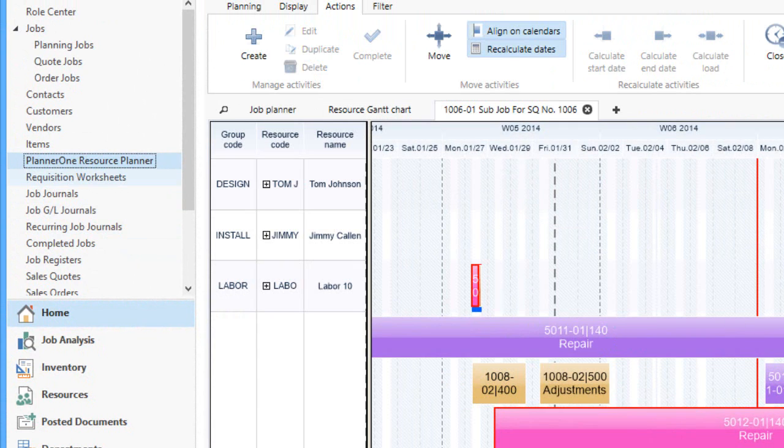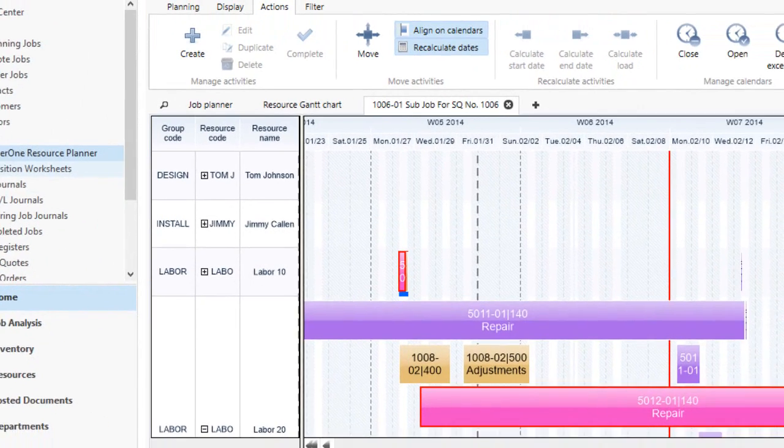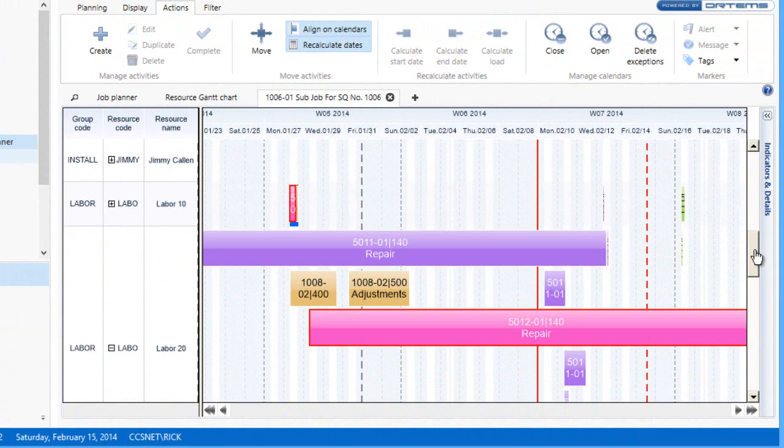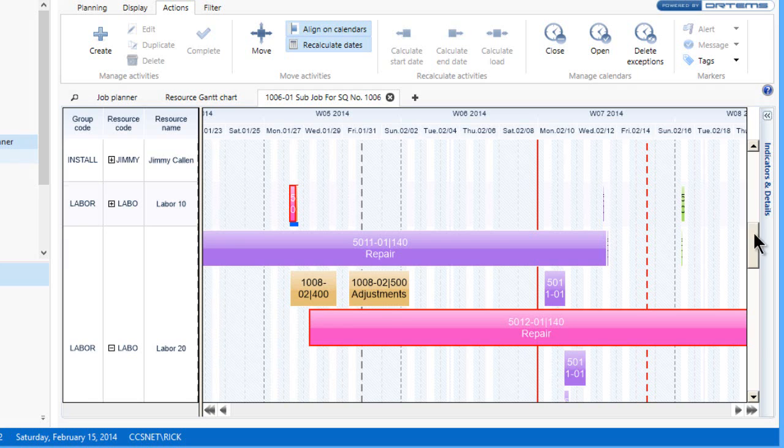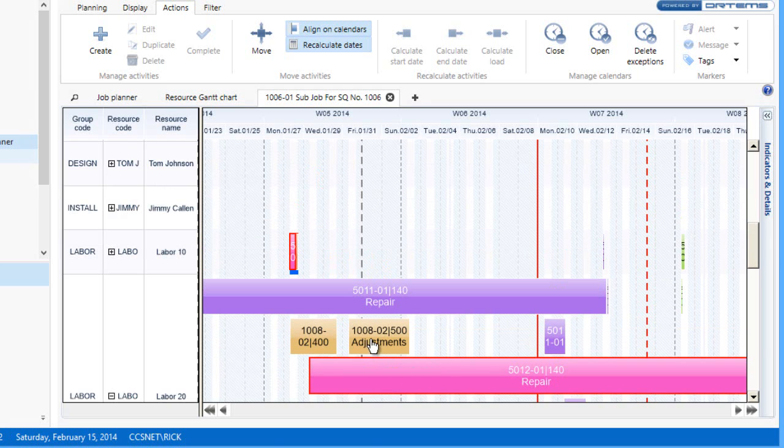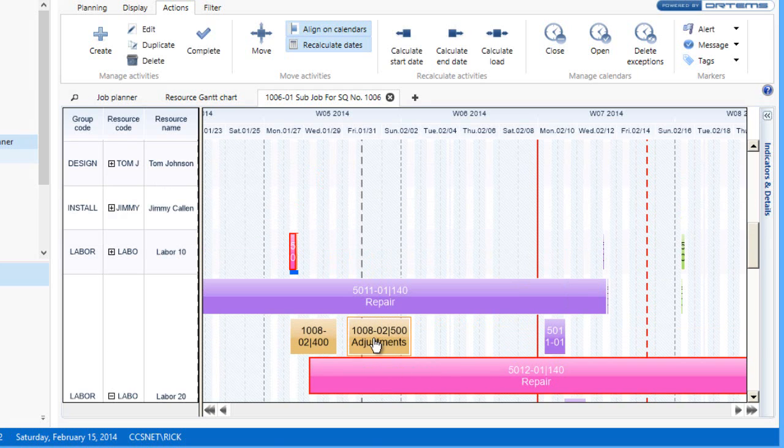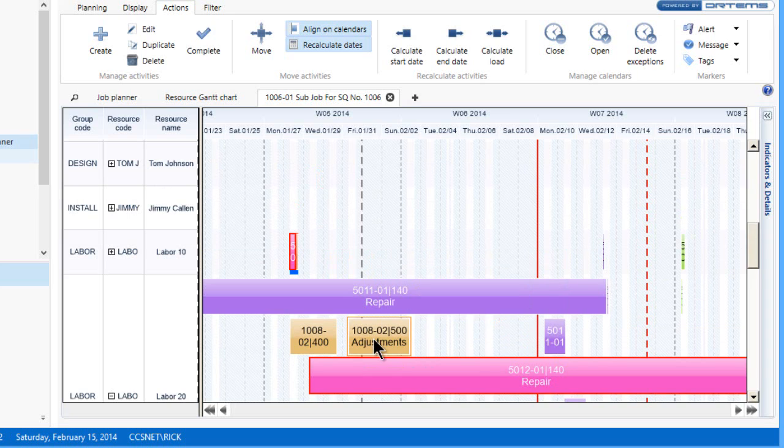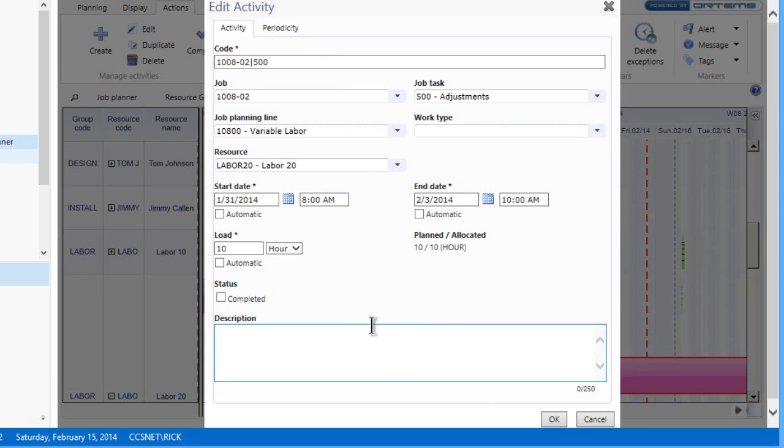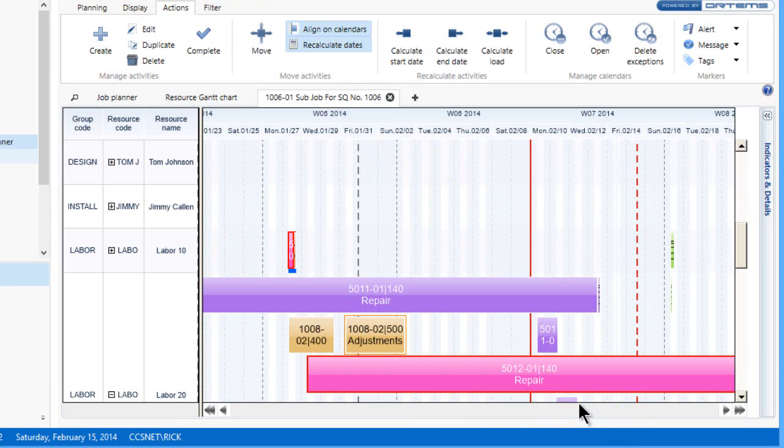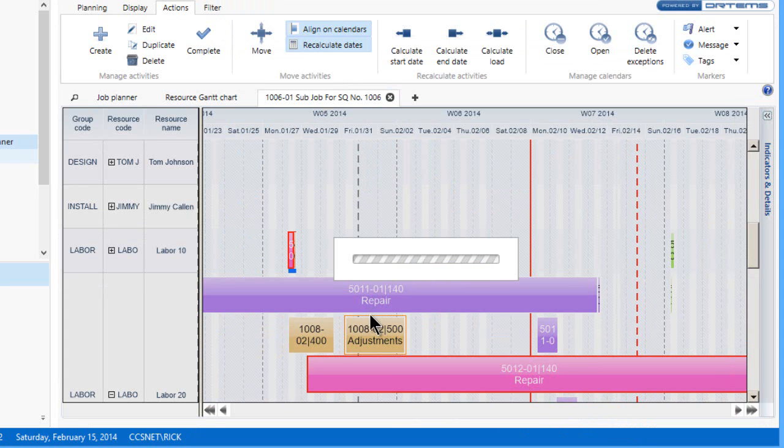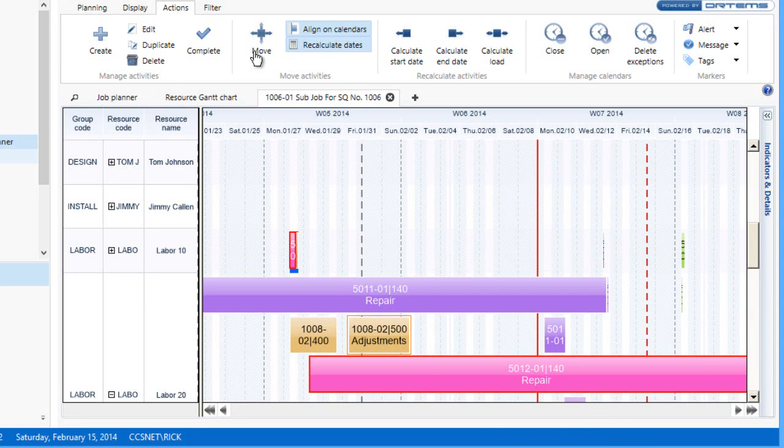I've got it blown up a little bit. It's kind of hard in the video to show all the activities, but I can give you an example of how you might use this. You'll see here's an activity for adjustments. It's basically assigned to the labor pool rather than an individual person to do these various adjustments—it's code 500 adjustments.